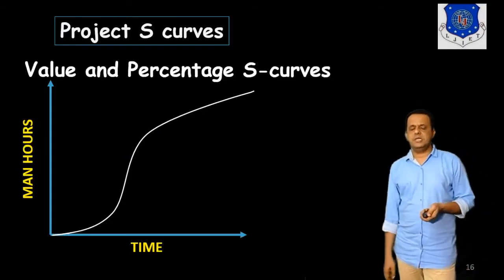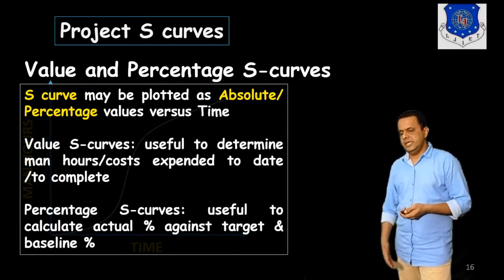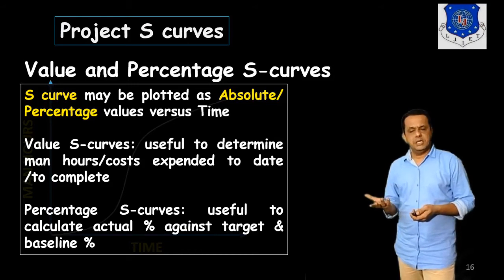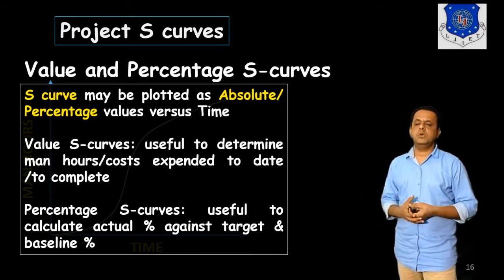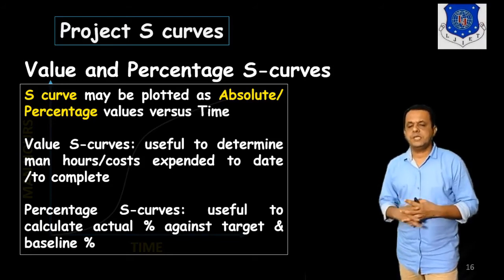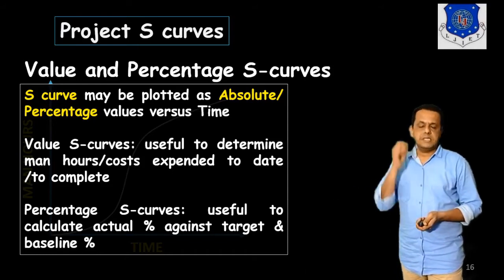Then here is the value percentage S-curve, where obviously we will be converting our data into percentage, and the value S-curve is useful to determine the date or expended amount up to date to complete, and the percentage S-curve will again be useful to calculate actual versus the targeted and baseline.